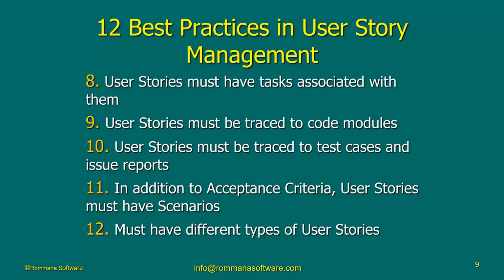So at some point, I may have 5 or 6 or 10 user stories in a given sprint, and only about 3 of them have been completed. How about the other 7? Well, we don't know. They have not been completed yet. Well, that's why we have tasks and we have percentage of completion for every task. That's what a tool shall do for you.